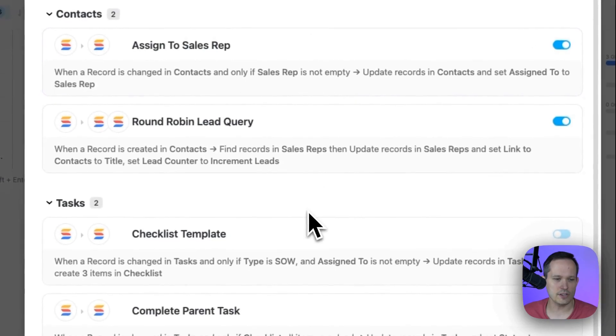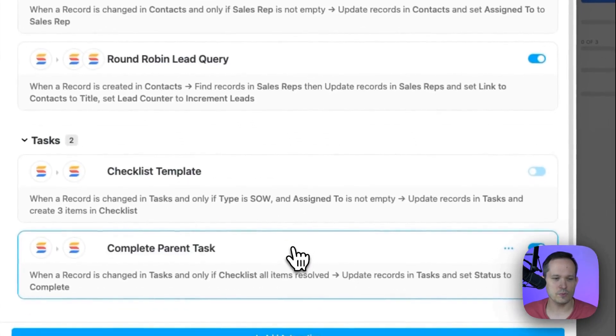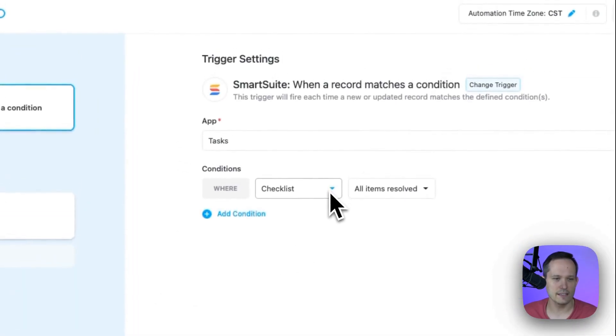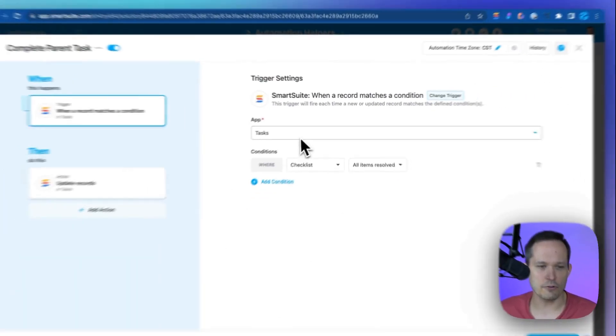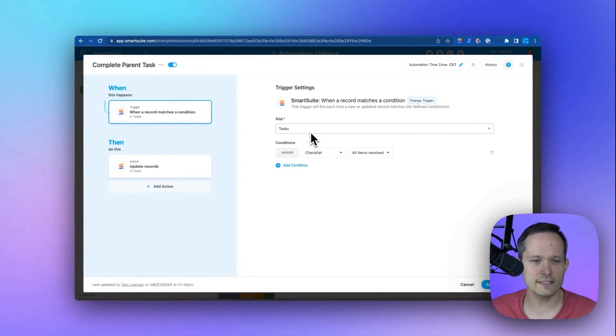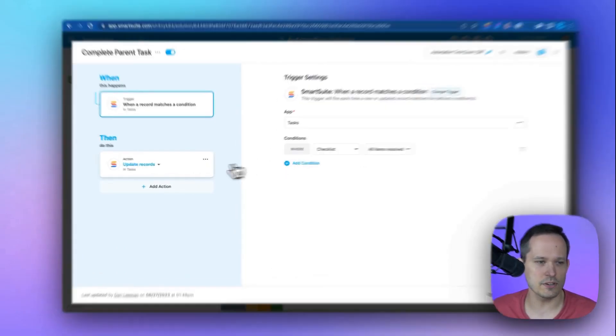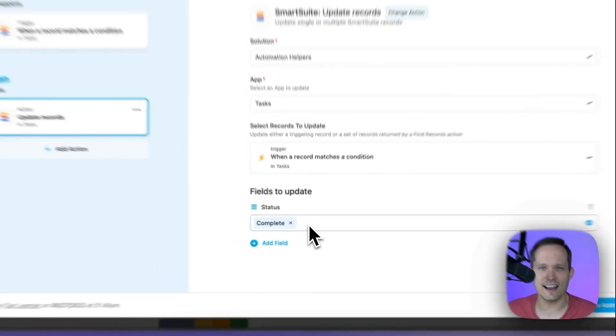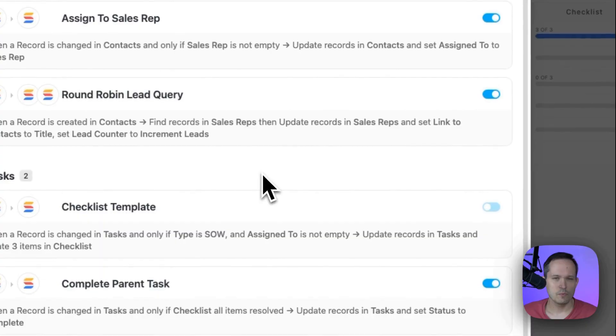We'll click on automations. And I have this one set up for completing a parent task. Here, we've got it running on our tasks. And when all of our checklist items are done, then we're going to update our record and set that status to complete.